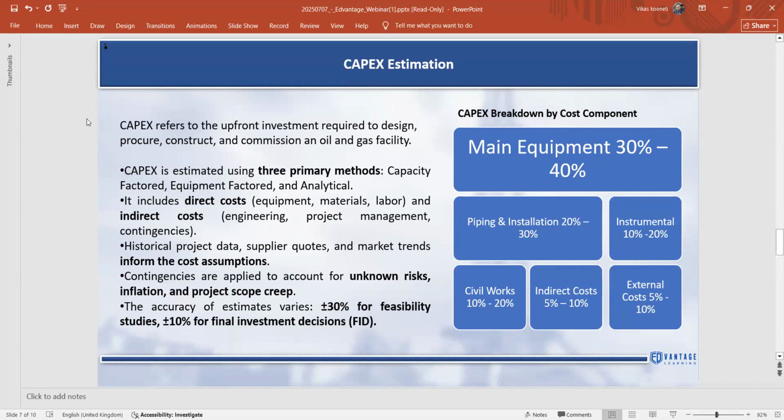So you might expand your capex stage. It can be between 1 to 3 years, but because you have very little funds available, or you don't have enough initial investment, you might expand your capex to 1 or 2 years more, considering you're going to bear losses as well with time. So these are the things which are very important in terms of capex estimation.